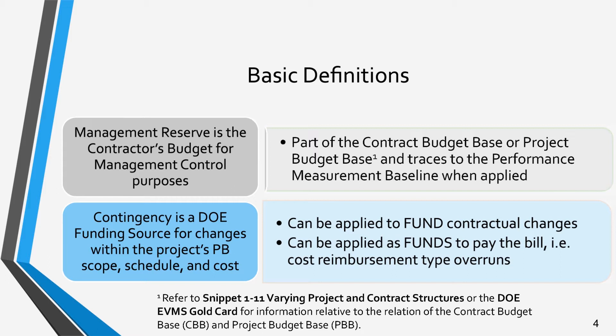Contingency may also be applied to pay the bill for overruns on cost reimbursement-type contracts. DOE is responsible to reimburse the contractor for all allowable costs up to the cost and funding limits established in the contract in accordance with FAR Clause 52.232-18, Limitations of Cost for any fully funded cost reimbursement contracts, and 52.232-22, Limitations of Funds Clause as applicable for incrementally funded cost reimbursement contracts.